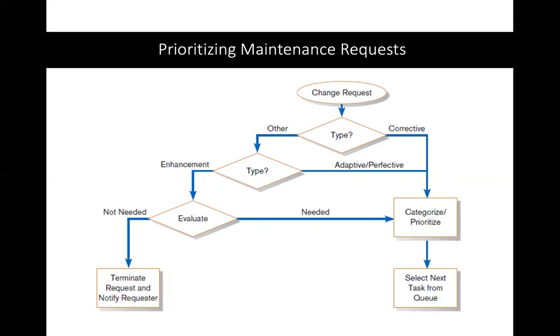So anybody can raise a change request. First question: type. Is it corrective, where we're fixing a problem, or is it something else? If it's corrective, let's categorize and prioritize them and see where they go.